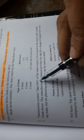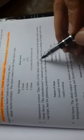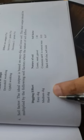The transmission system takes 80 percent of the ideal output based on a power shift system. Then if you have grade factors like natural slope, like downhill or uphill, working increases by 2.5 times or decreases due to grade. Soil factor depends upon the effort: easy dig, medium dig, hard dig.